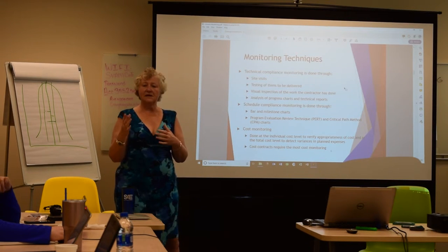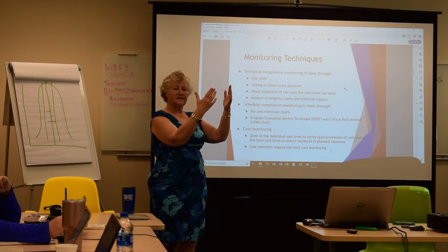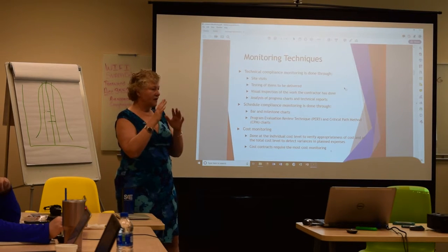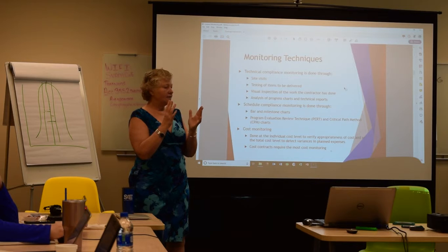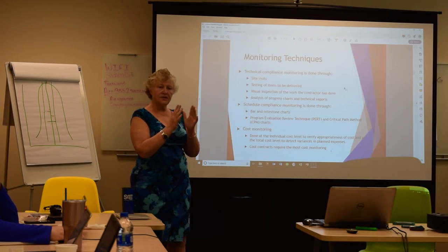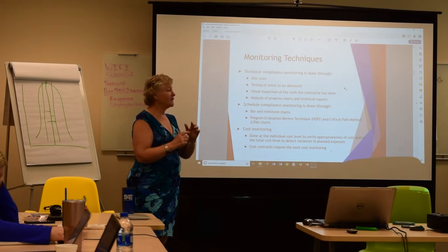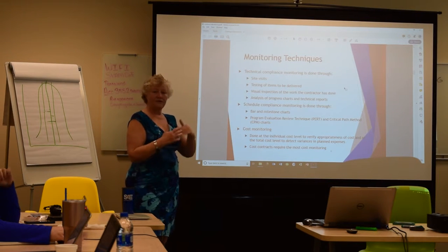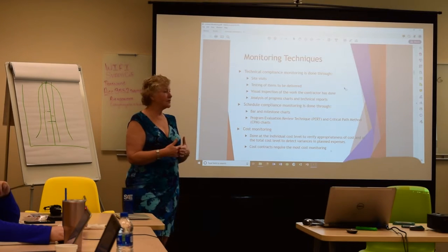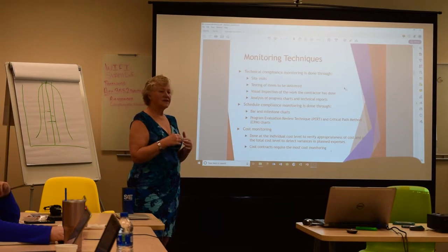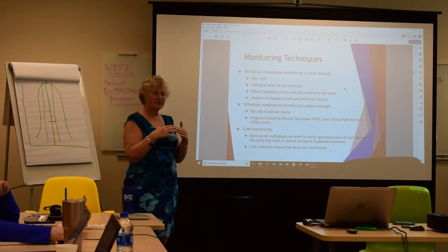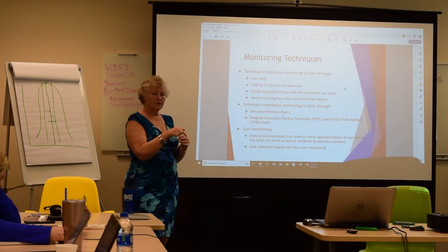Now, obviously, there are some times where there's a lot of upfront work that needs to get done before, but the government should have a pretty good feel that unless there are extenuating circumstances, we should be at the 25% mark across the board. If we're at the 50% cost mark, and we've only gotten 25% of the work done, there's trouble in River City, right?